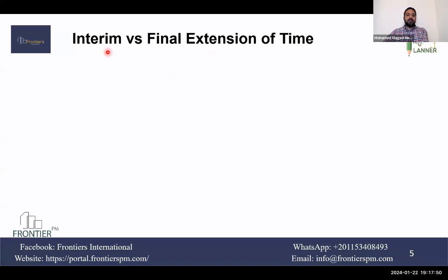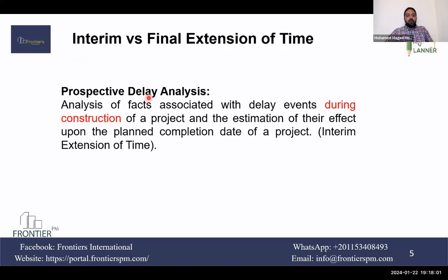So this first reference is classifying it to interim and final extension of time. It's considering the prospective delay analysis as interim because it's happening during the construction. So we can have an interim claim, and then another interim claim until we complete the project.